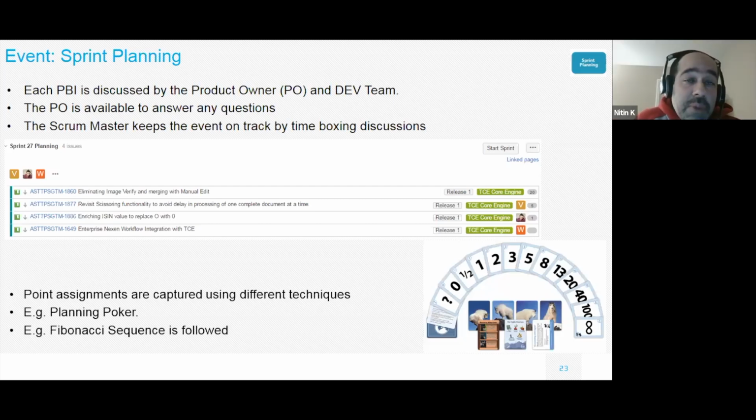Yeah, and just to supplement what you said about numbers, metrics are always going to be floating about on any initiative. Just going to go a little off tangent. Your dev team members might say, hey, a 20 is like an epic. It needs to be broken down, right? And this could get a little into advanced concepts, into release planning or early estimations. Let's say there's a new initiative starting off. You don't have all that information. A Scrum Master could facilitate saying, hey, let's think about epic points, because we don't have stories.